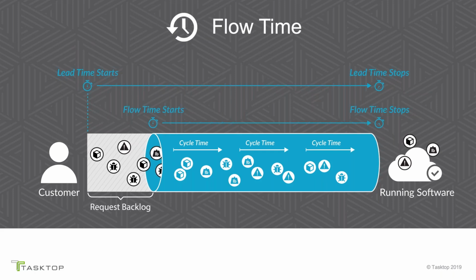But a lot of time that doesn't work because people request things that may never make it into the product. I would like the home screen to be purple with yellow polka dots. That's a great request. It'll never happen. So your numbers for lead time are going to get, kind of, the average is going to go up because there's a lot of features that you will never work on.